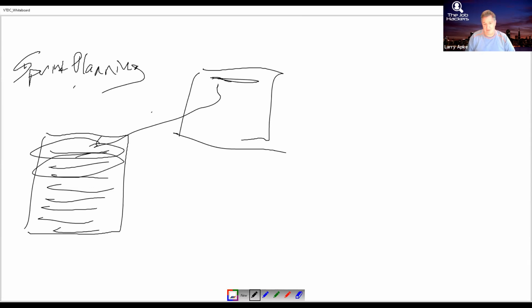Next one, same question. Do we still want to do it? Can we do it? Move it in. And on and on until we get a bunch of stories in here. And then we're going to keep going basically till we can't fill it up anymore. And we're going to ask them, okay, is this a reasonable plan? Are we missing anything that we should be doing? Should we kick anything out? Are we trying to take too much?